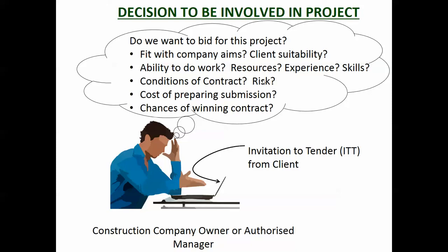And so most New Zealand contracts will use the NZS 3910 conditions of contract, and the reason why it's fair is because it's a fair allocation of risk. So if something goes wrong, then who pays? That's what risk is all about, and that's what NZS 3910 is all about, is fair allocation.